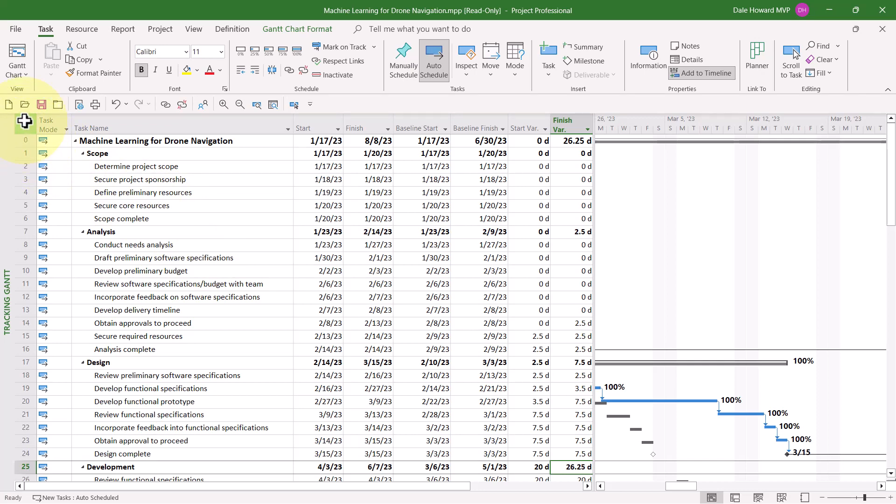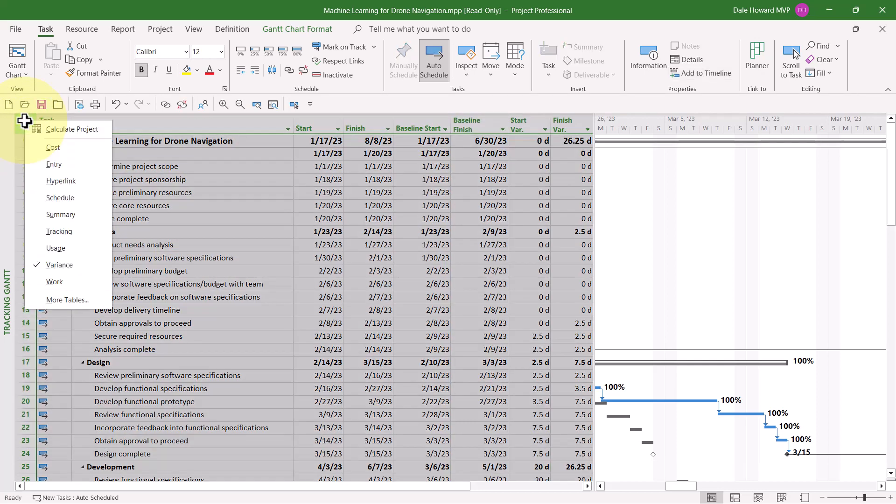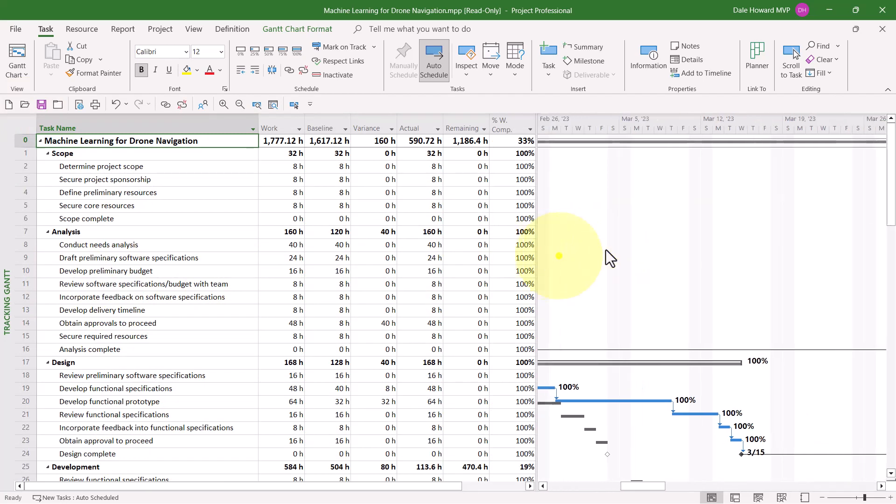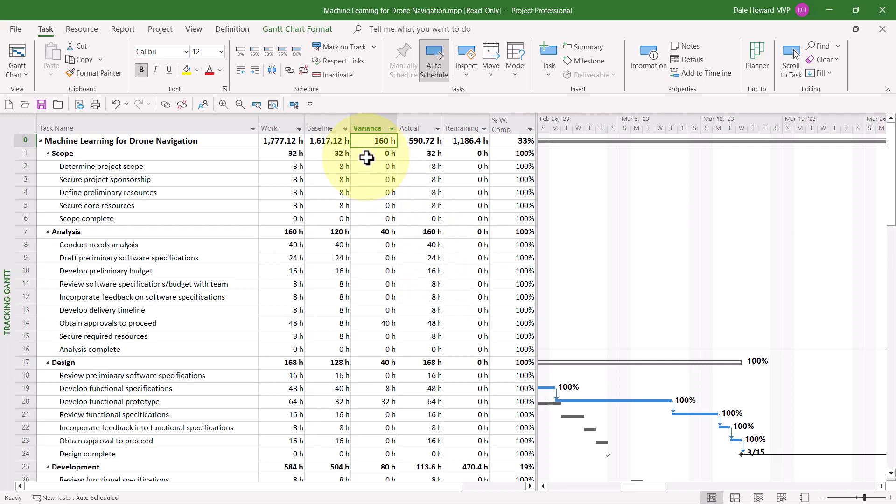To display the Work Table, right-click on the Select All button and choose Work on the menu. Drag your split bar to the right edge of the Percent Work Complete column. The column here that you're interested in is known as Variance. So, for Row 0, representing the entire project, this project is currently 160 hours over its original budget on work. Now, as we go through the project, the Scope section finished exactly as planned.